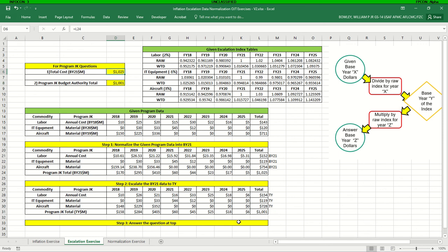And if you look at the spread of the total dollars in the program, if you look at this is base year 21, you'll see that the majority of the cost is actually before this base year 21. So when you convert these then year dollars to base year 21, you're actually increasing them. So the majority of the cost is before this base year, therefore it's being increased when it's converted to the base year. So this actually does make sense in this particular scenario, because of how this cost is phased over this period of time and what specific base year we're looking at.